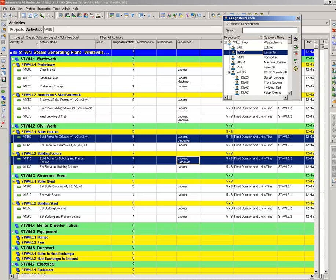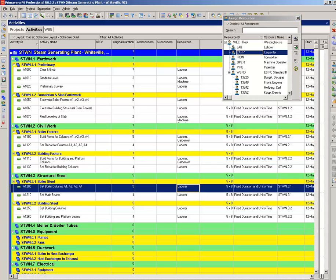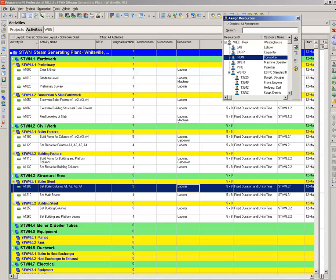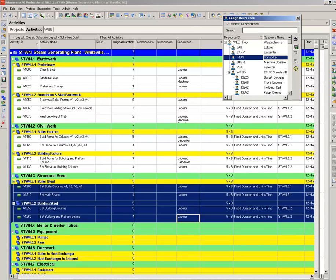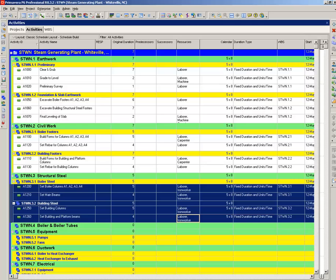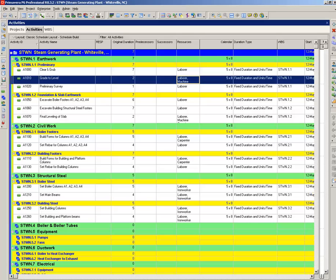So let's, with the control key, left click, add. We just added a carpenter to these two activities. Coming down through the structural steel, you're going to need an iron worker. And you're going to need an iron worker on all of them. With the shift key, left click, we've selected all of them. They're highlighted and we just assigned the iron worker.